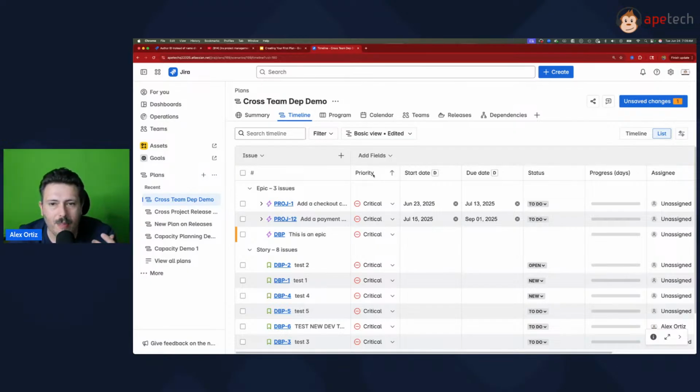You're at the same level. Because if you're not, then you're going to be talking apples to oranges. Sorry, you're going to be talking apples to apples, and you're going to be more on the apples and oranges, and it's just going to create all kinds of confusion. So my recommendation is when you're doing this dependency tracking, be at the same work level. Because if you're not, like I said, even though you can track an initiative down to the subtask and do 4 layers deep, it's not going to make a whole lot of sense, because a subtask inherently is very different than an initiative, and it's kind of weird to block an initiative because of a subtask. But it makes more sense that you're blocking an initiative because of another initiative, or an epic because of another epic, and so keep that in mind.